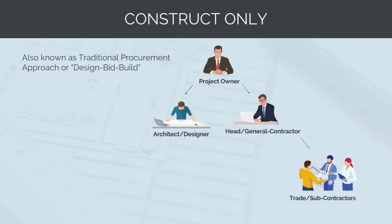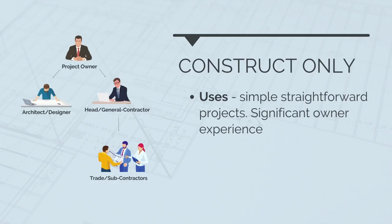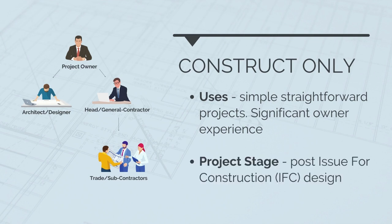The construct-only model is often referred to as the traditional procurement approach or design-bid-build model. In this model, the project owner directly engages a designer to develop an issue-for-construction drawing set, then runs a competitive tender between multiple head contractors who quote to deliver the works for a fixed fee based on the IFC design. The head contractor is engaged for the construction scope only. Construct-only contracts are generally used for simple, straightforward projects where there is not a lot of uncertainty — typically building construction, which has been done thousands of times and has few unknowns compared to civil infrastructure. The owner will need significant experience and expertise to manage the design process themselves. The contractor is then engaged after the issue-for-construction drawing set is ready and is not involved in the design stage at all.